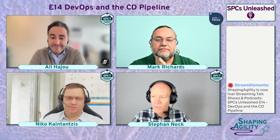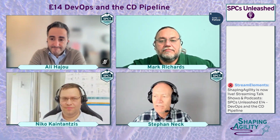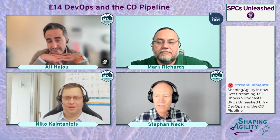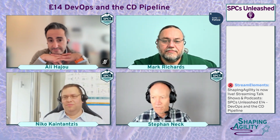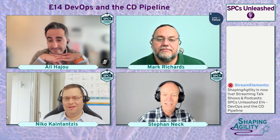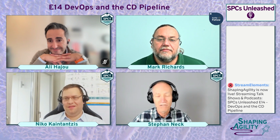And when it comes to investment, I often use that analogy with senior management. And I also like one of Marty Cagan's statements. Let me quickly read that one because I think it's crucial when it comes to the CDP. Deal with engineering goes like this. Product management takes 20% off the capacity right off the top and gives this to engineering to spend as they see fit. That's tender love and care, right? If you're in really bad shape today, technical debt, you might need to make this 30% or more. And then he concludes and says, I get nervous when I find teams that think they can get away with much less than 20%.